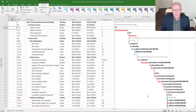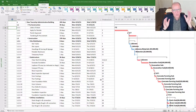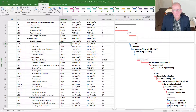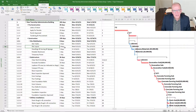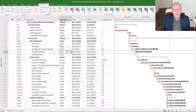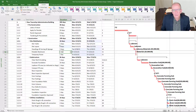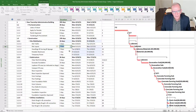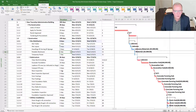One way that a lot of people think of buffers is: we want to start here and finish there, so they put together their activities and doing the network they might pad their activities. Padding basically means giving extra time — so for example, if I think the site layout takes two days, maybe I give it three or four days. That gives me a little bit of extra flexibility later on. This particular example is showing float, which means it already has some flexibility, but if it was a critical task item shown in red...